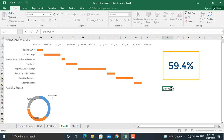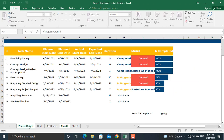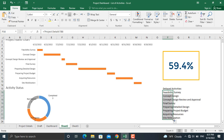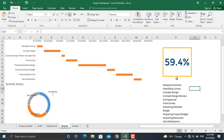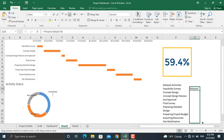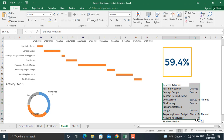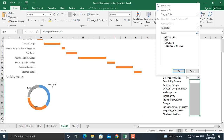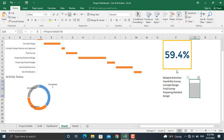For the delayed activities, in the first cell write an equals sign, go to project details, and click the first cell containing the activity name, press Enter, then drag down until the last activity — site mobilization. Do the same for the status column. Then select all this data, go to Sort and Filter, and click Filter. Since we don't want these headers visible on the dashboard, change their color to white. Then click the filter and select only 'delayed', and click OK.